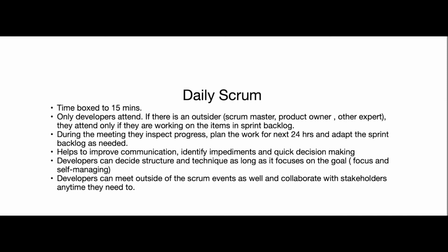Daily Scrum. It's time boxed to 15 minutes. Only developers attend the daily Scrum. If there's an outsider, like the Scrum Master, product owner, or other expert, they attend only if they are working on the items in the sprint backlog.